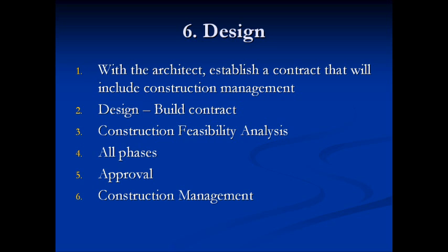so that costly delays by way of RFIs and change orders will be minimized. So the architect-led design build contract, establishing with the architect construction management as part of his responsibility. Face it, he's going to be interacting with your general contractor anyhow by way of RFIs that the general contractor may have, requests for information.